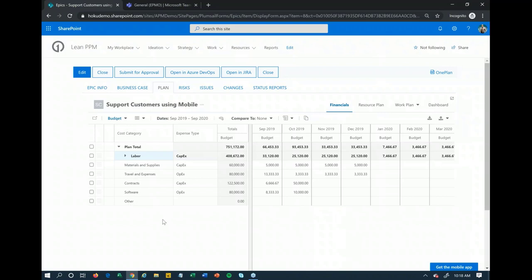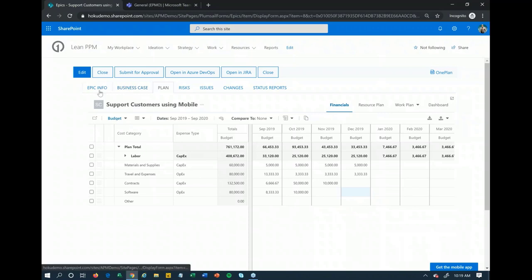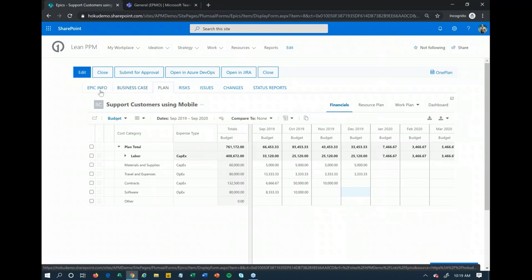We can group costs into different ways — like capital expenses and operational expenses — if need be. This is very much an online Excel spreadsheet-type interface, so I can come in and key in all those other costs, and that's all going to roll up to give me a total budget at the top. So it's saying to do this particular 'support customers using mobile' epic slash project, I'm going to need about $761,000 based off of that resource plan and any other costs added in. Now we have more information around this project — the resources, the financials, the scope of both resource and financial requirements.